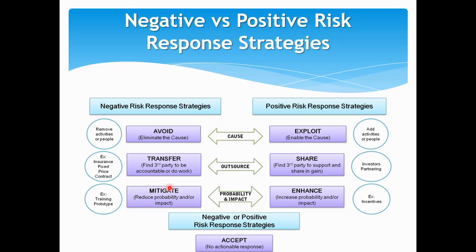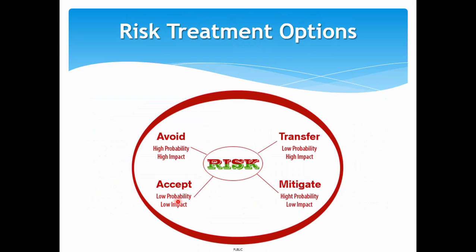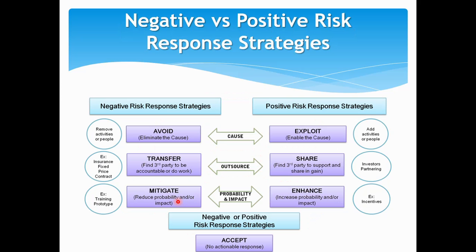And maybe high probability and low impact stuff. Those things you will have to take actions to mitigate, such as training, or such as prototyping. Here you will actually be spending much of your time, in managing your risks. The same goes for the positive side.